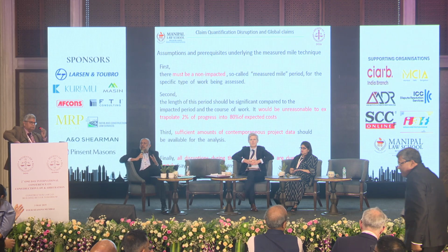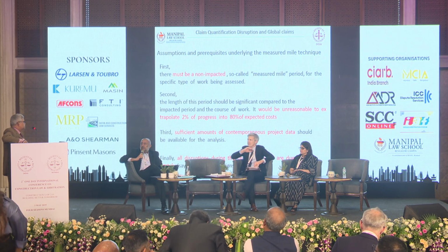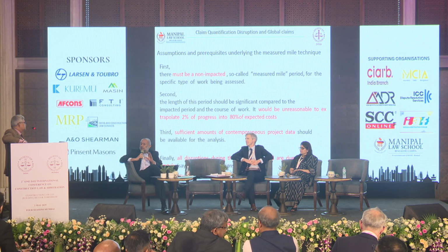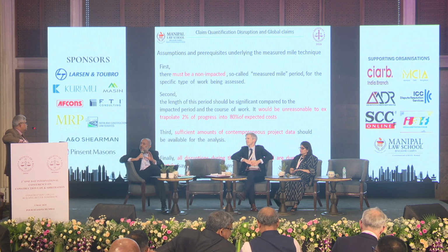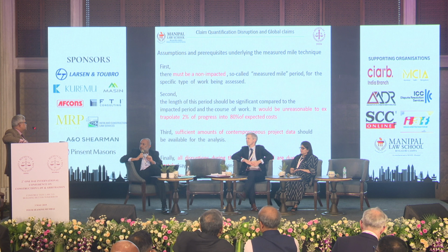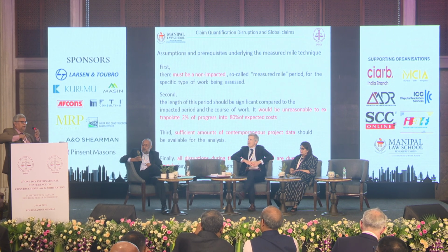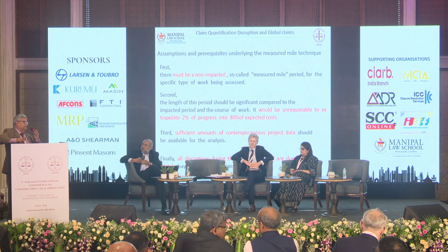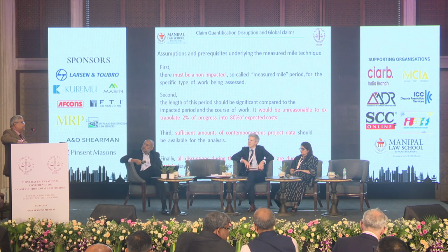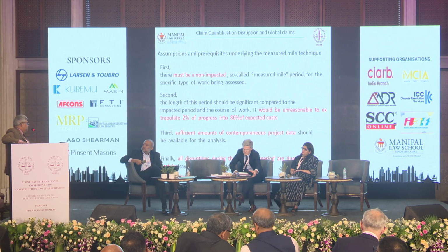There's a very fundamental issue that arises in most of these matters: if there's a disruption claim where there's an identifiable employer-related cause, and it overlaps with a non-employer-related cause, let's say weather, in such a case, how do you normally deal with it? The legal guidance here is the contractor would be entitled for the period where the employer has caused the disruption.